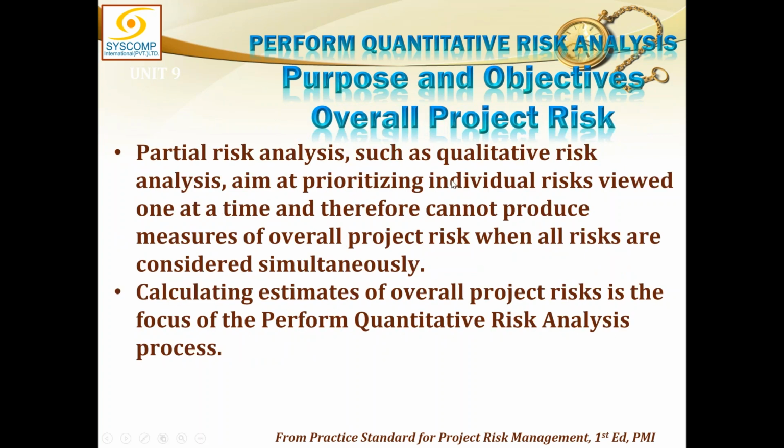Partial risk analysis, such as qualitative risk analysis, aims at prioritizing individual risks viewed one at a time, and therefore cannot produce measures of overall project risk when all risks are considered simultaneously. Calculating estimates of overall project risk is the focus of the perform quantitative risk analysis process.